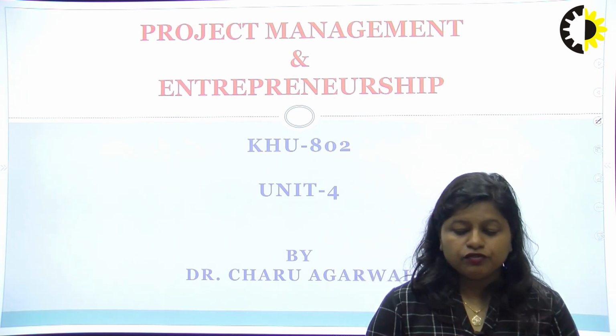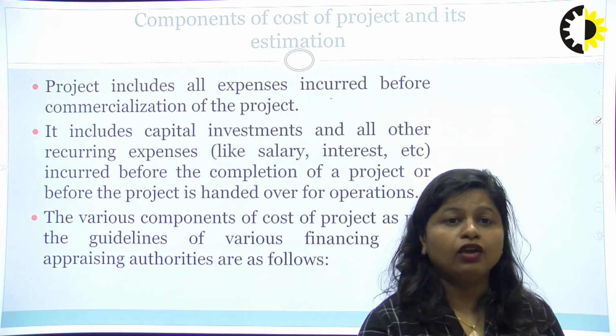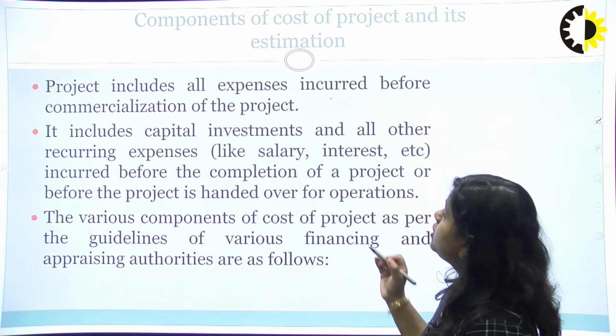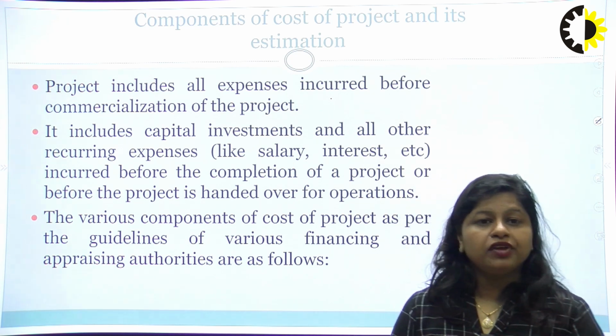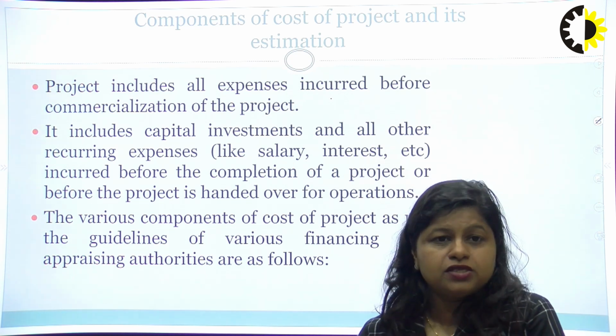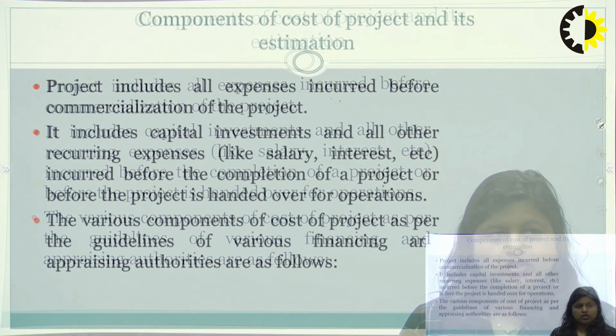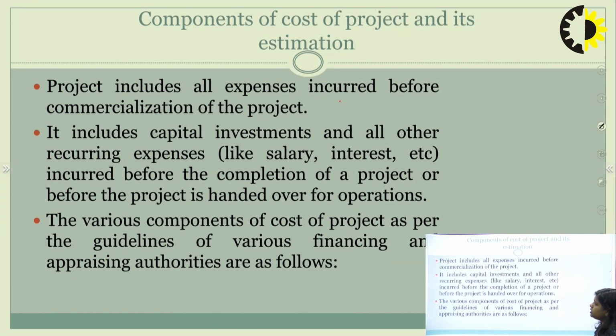So for that, we need to find out what the components are which are part of the cost of the project, and how we estimate those components to find out the total cost of the project. To find this out, we need to estimate all expenses which are incurred before the commercialization of the project. What does this mean, before the commercialization of the project? Like from the inception of the idea till the completion of the project.